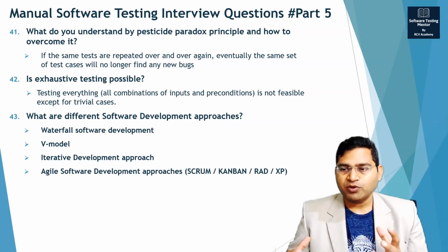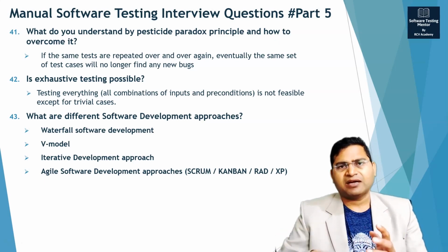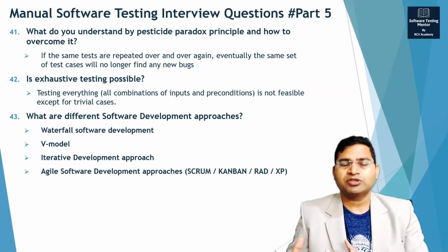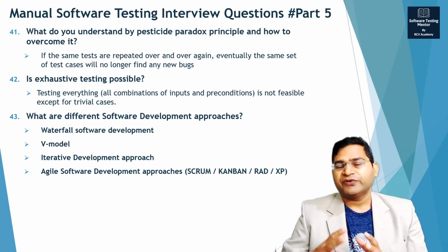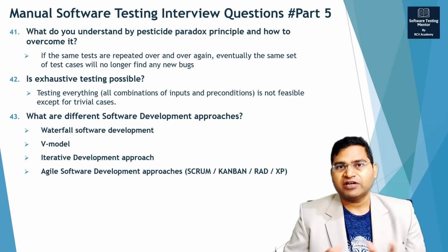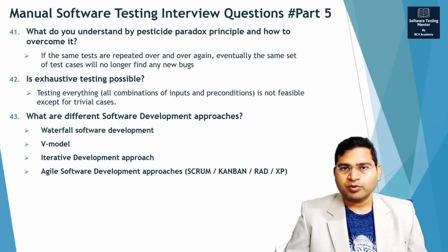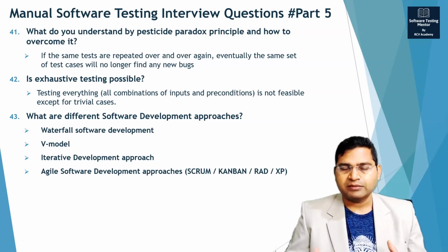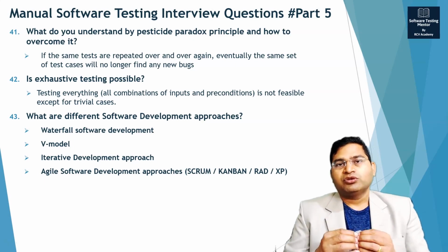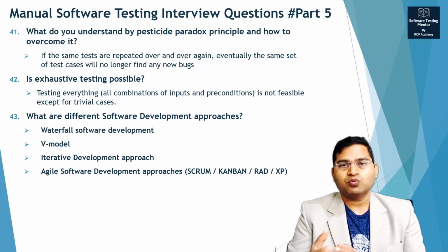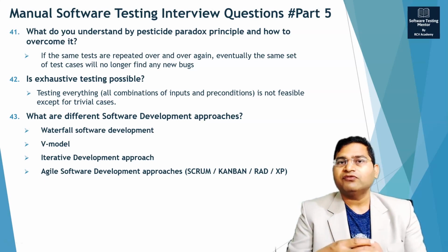And the problem with this approach was that the feedback from the customer or the production deployment was far away, 6 to 12 months. Because of that, the feedback from the customer came very late in the cycle. Say, for example, you have done all the development work for 12 months and the customer saw the product and said, no, this is not what I wanted. This is not as per the expectation. That triggered a lot of rework. So that's where the waterfall development approach was very limited and had a lot of shortcomings.